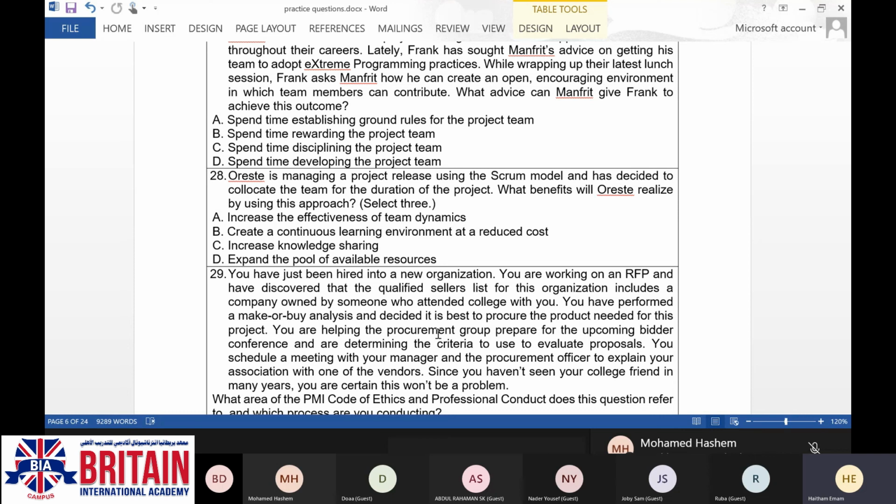War room, each and everyone is going to work beside each other. So at this moment, we are going to break the ice between the team. We are going to encourage the team spirit between the team members. We are going to transfer the knowledge easily between the team members, even without having certain formal training and paying money for it, because each and every one is seeing the others.